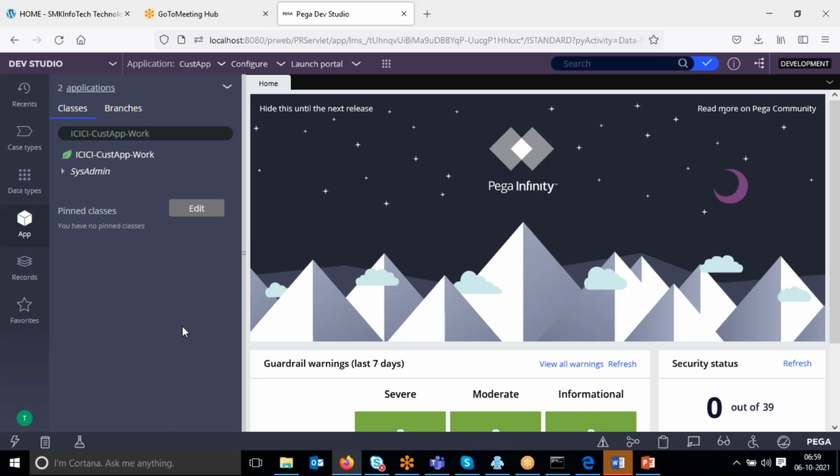I'm just telling you. For example, an account form screen is a simple screen. For a simple screen I can give 8 hours. For a medium screen I can give 12 to 16 hours. If it is complex, then I can give 32 hours. So we'll define it like that. It's not only Pega, everywhere. All development projects define it like that. It's not fixed, as I told you, even simple is 8 hours.